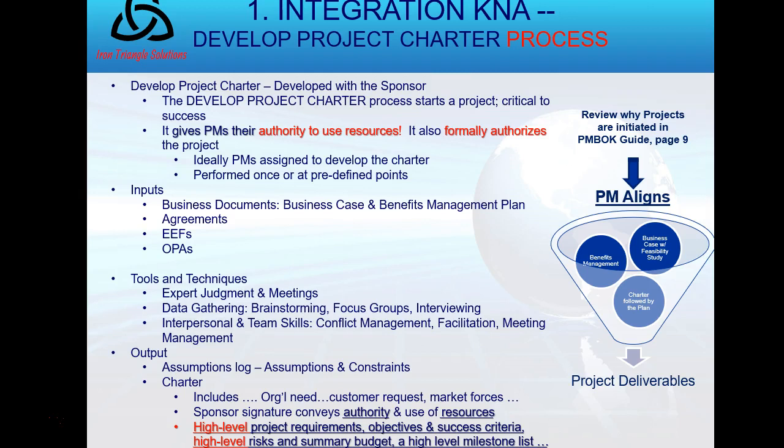And then you'd want to follow up on the agenda for action items. Okay, the outputs then to the charter, a develop project charter process is the charter. That's the number one output. Includes at a high level, remember the business case was very, very high level. The charter now is high level as we begin to drill down. It'll have high level requirements, objectives, success criteria, a summary or rough order of magnitude budget, milestones, etc.